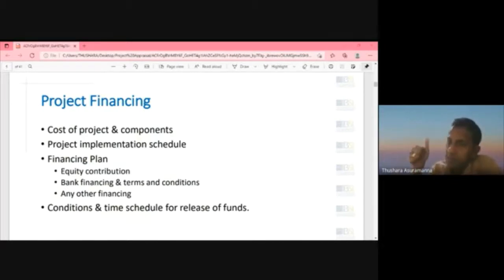Why? Because this is complex and long term. If you remember, last week we discussed the nature and the importance of project financing. So this is a critical factor, because if they are unable to track or unable to proceed as per the agreed timeline, delays may occur. As a result, repayment delays. Right? So pre-sanction supervision is a greater necessity in project financing,